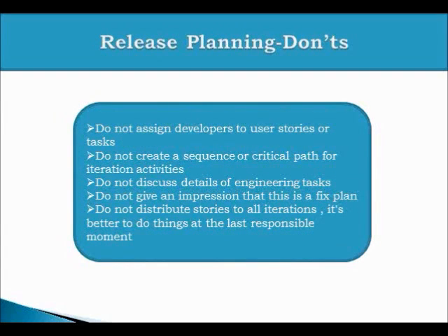Don'ts of release planning: do not assign developers to the user stories or tasks. In a release planning meeting, we should not think of allocating people, saying this is for you to develop in iteration 1, this is for you to develop in iteration 2. For that, we have the iteration planning meeting or sprint planning meeting. So don't do the work of the iteration planning or sprint planning meeting in the release planning meeting.